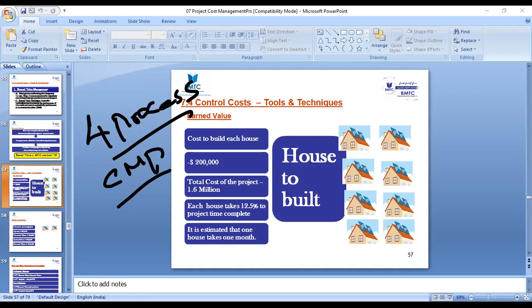Unit of precision is the way you're going to round your cost, whether you're going to round down or round up. Round up is something like, if the particular work requires you to spend 99.75, you'll be making that one as 100 rupees. If something is coming like 101.25, you're rounding down that one as 101 or 100, right? So it's very easy for you to do the calculations. So unit of precision will be there in the cost management plan.